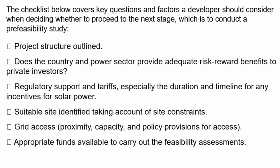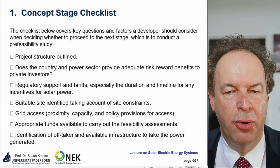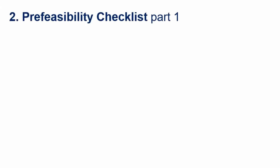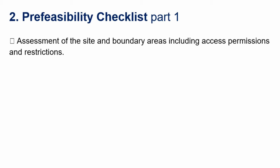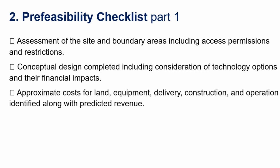Appropriate funds must be available to carry out the feasibility assessments — someone has to pay for it, because you spend several weeks or months on that. Identification of the off-taker and available infrastructure to take the power generated — usually called a power purchase agreement. For the pre-feasibility checklist: assessments of the site and boundary areas, including access permissions and restrictions. Conceptual design completed considering technology options and their financial impacts — for example, for some sites you can't have big reflections because there's an airport, or you may need a tracking system. Appropriate cost of land, equipment, delivery, construction, and operation, identified along with the predicted revenue.